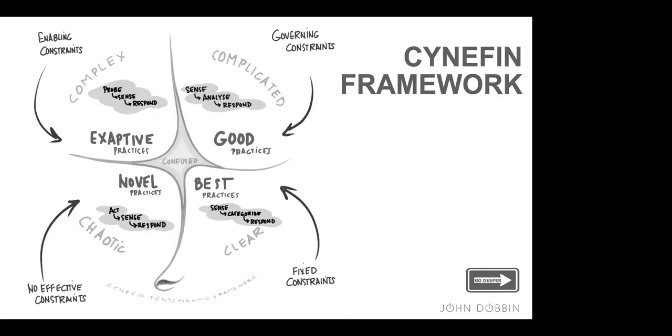Your center of excellence should be able to determine whether that problem is clear, complicated or complex. If the requirements are clear but they might need some external expertise, like contracting a data engineer, then that can still be done with waterfall.